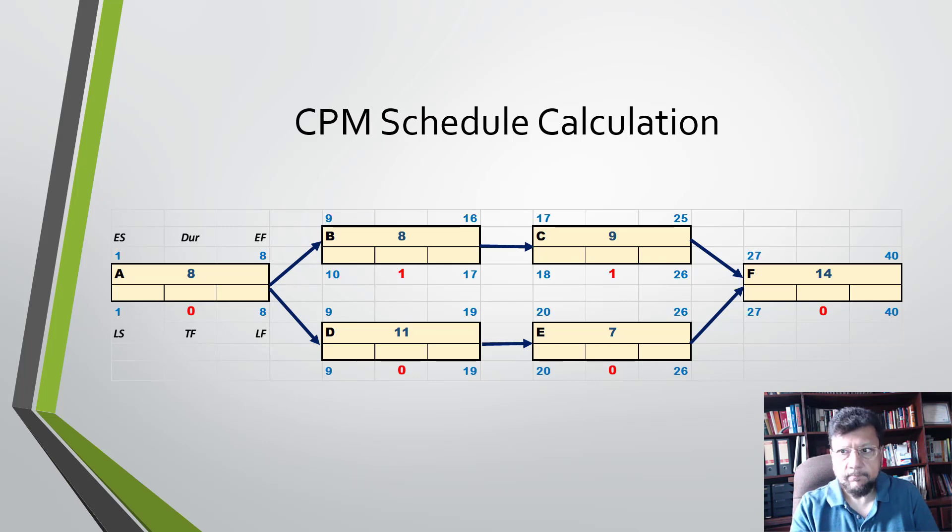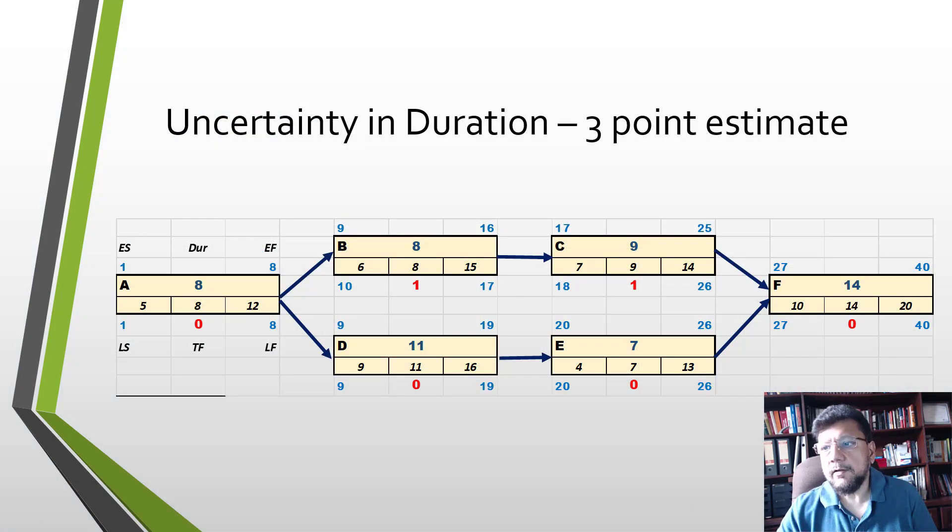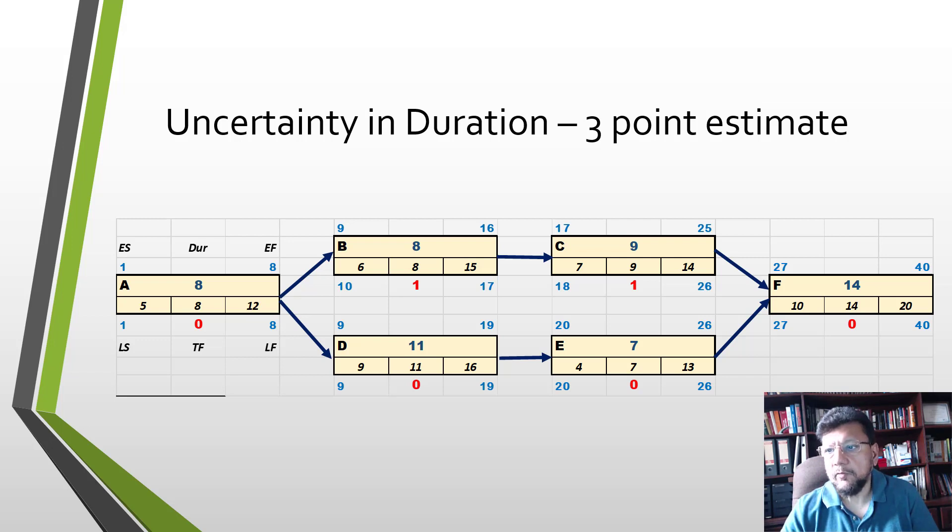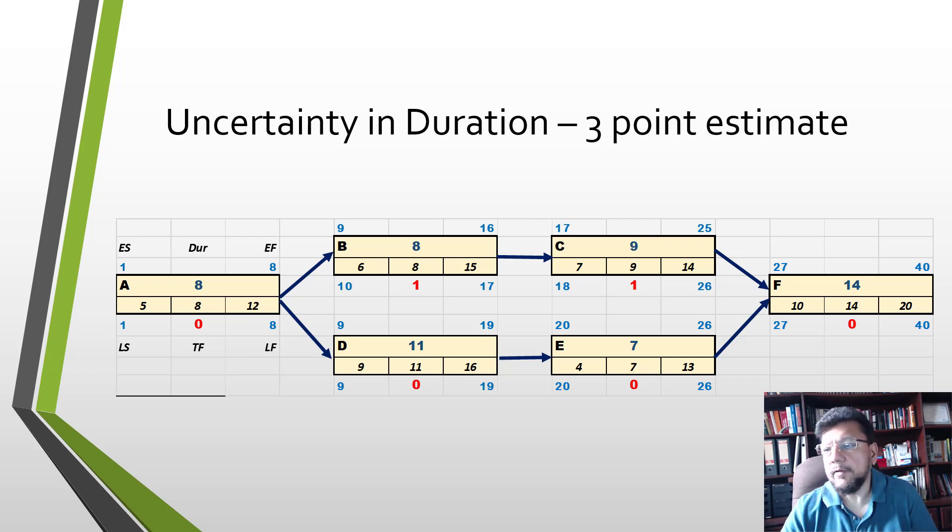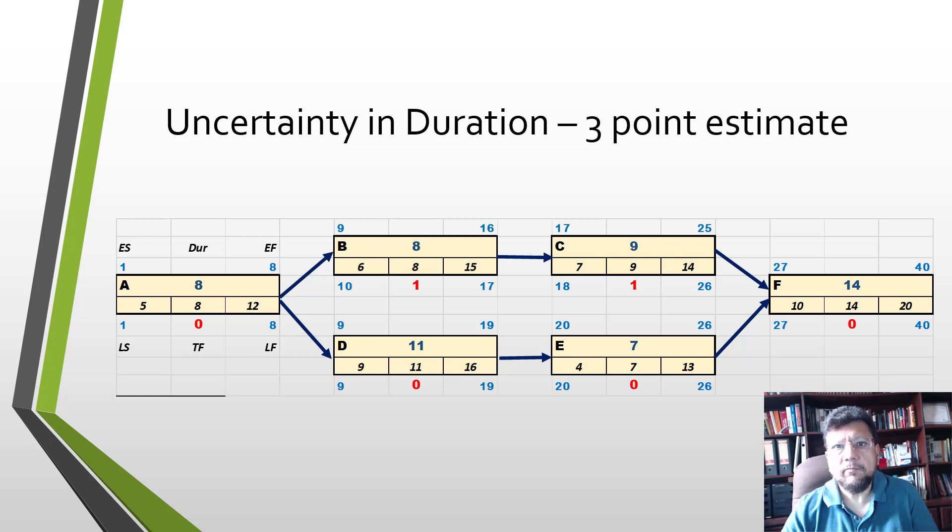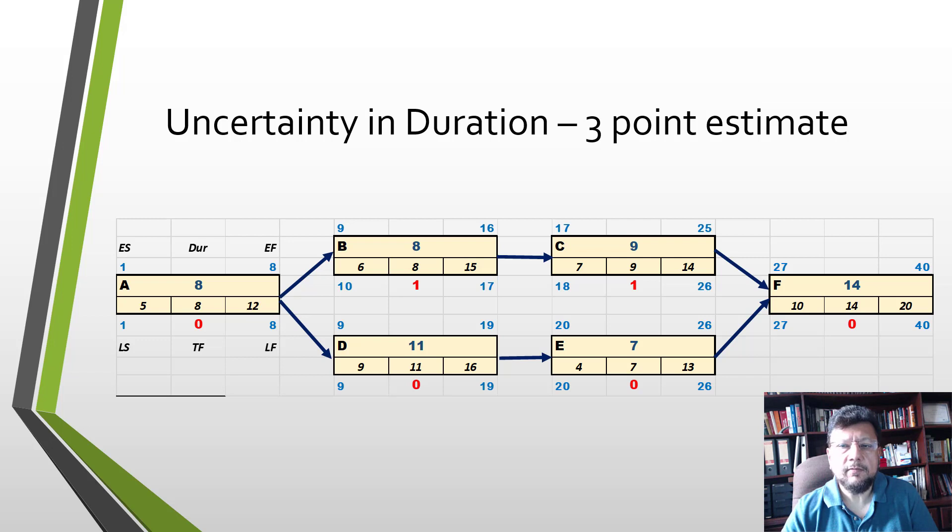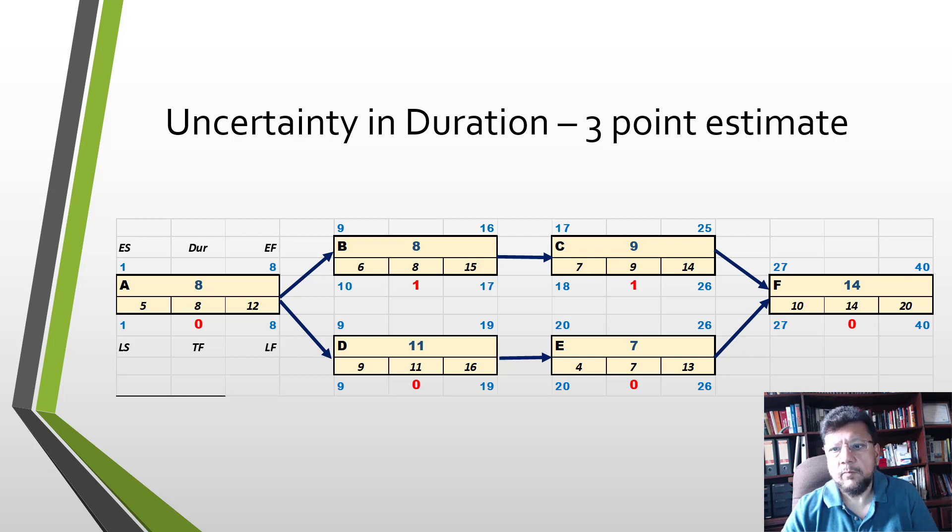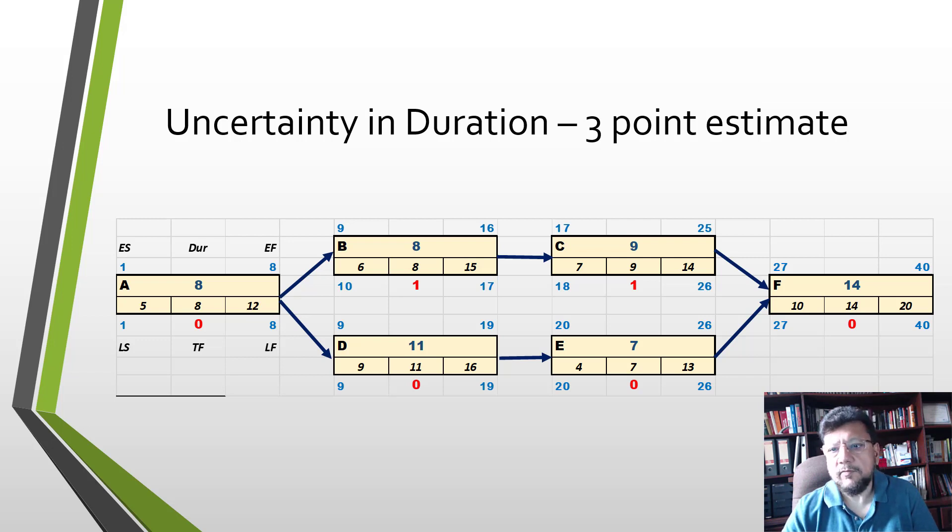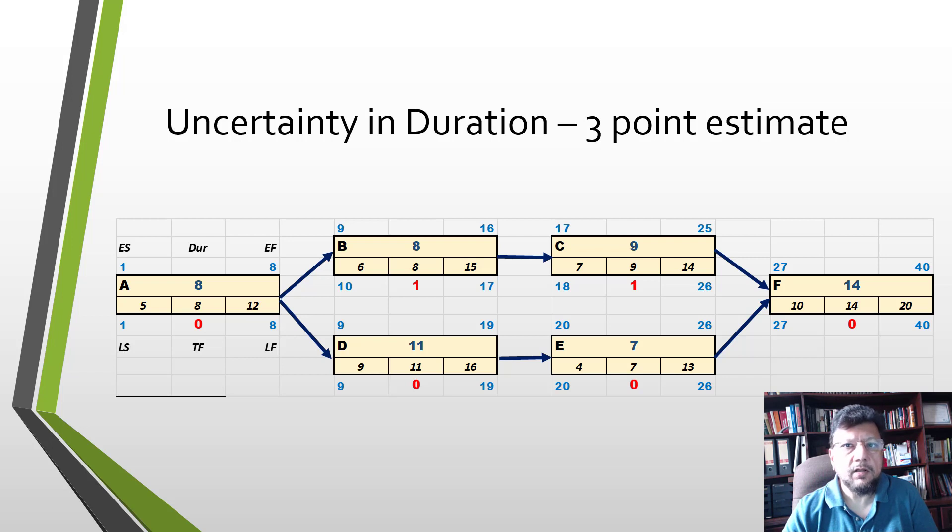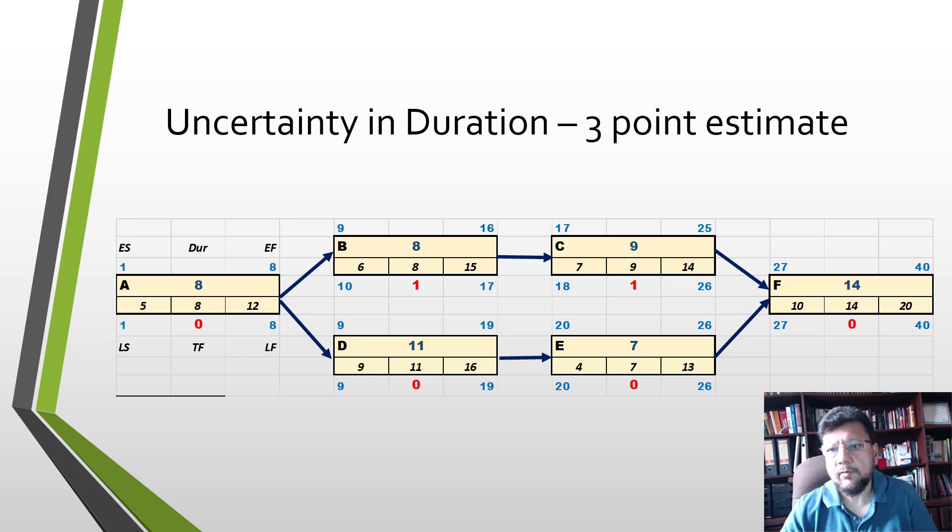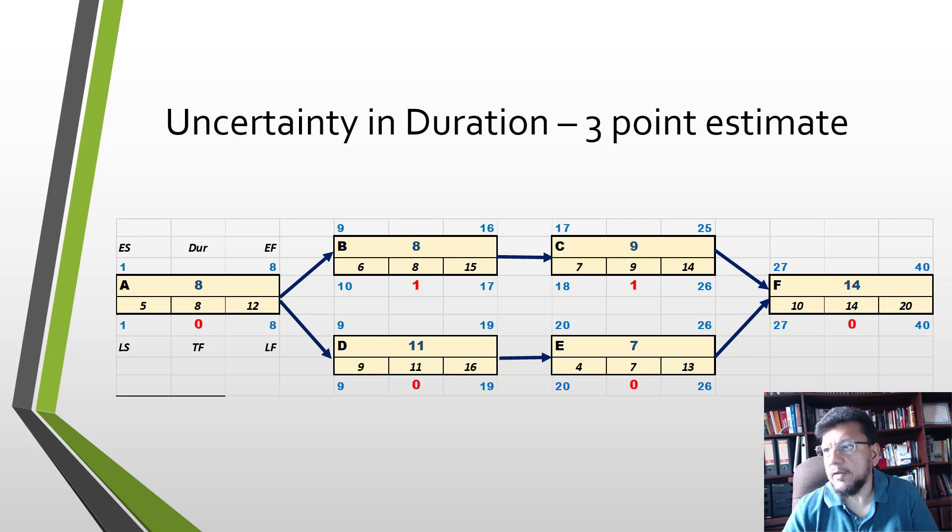If we now add those three-point estimates to the same schedule, we have a completely different problem. We now have six activities and each activity has estimates of durations that can vary. For instance, A can vary between 5 to 12 days, 8 is likely, but you can get any duration in this range. Same happens with all of the other six activities.